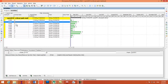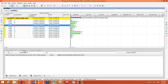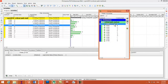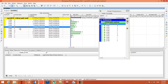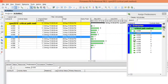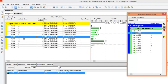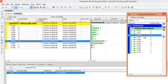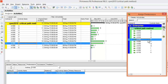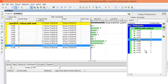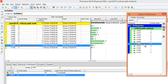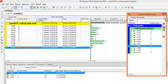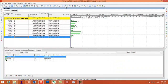Next is to give the relationships. Go to the Predecessors tab, click Assign, and choose predecessors from the window. Once done assigning all relationships, close the predecessor window.